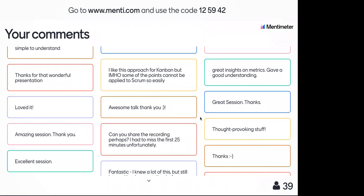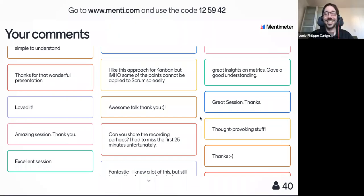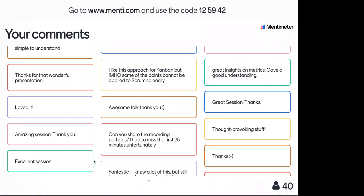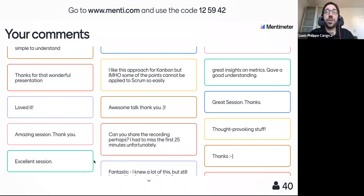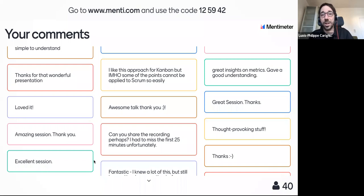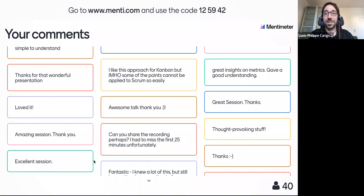Ivan has shared both my GitHub account and Matias Batiston's account in the chat — Matias also has spreadsheets available with metrics and a metrics book. A question: what do you think about cumulative flow diagrams? They're a great tool for retrospectives, looking at how your system is behaving and asking good questions about your actual work in progress — knowing that limiting your WIP will usually make your cycle time shorter. It's one of the great tools that Kanban metrics is bringing to the Scrum community.